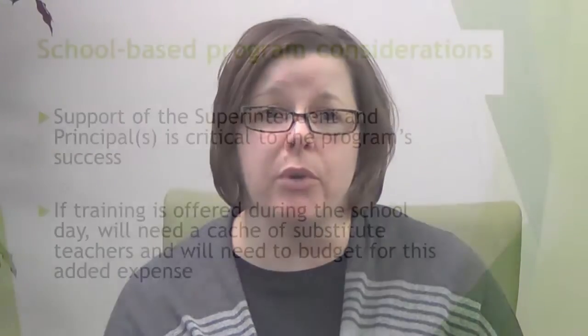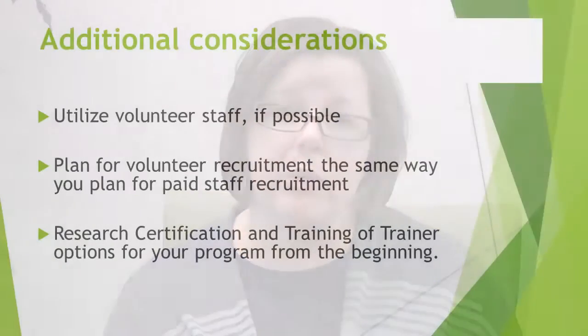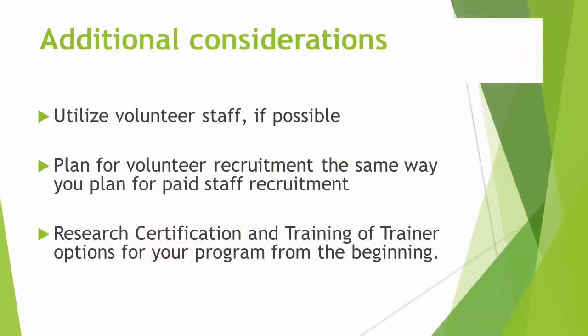For school-based programs where the intention is to train teachers, superintendent and principal support will be critical. If training is offered during school hours, substitutes will most likely be needed. This is an added expense and should be considered within the project plan and budget. It is essential to plan for volunteer recruitment and training in the same way that you plan for hiring paid staff.